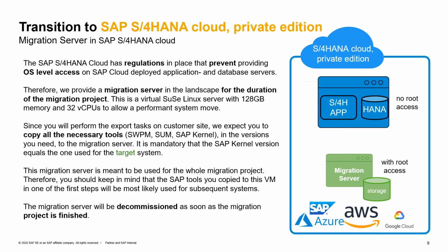The second topic I would like to touch on is the approach that we have prepared for you as a partner in order to drive all the activities for a migration or a conversion project. The S4HANA Cloud has in general some regulations in place, and this will prevent you from directly accessing the operating system and the database level with root access. Therefore, we have decided to provide you with a migration server, which is a temporary virtual machine in which you have full access, including root access, in order to perform all the related migration project activities.